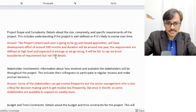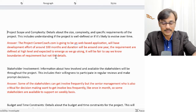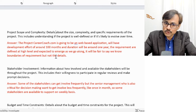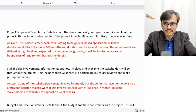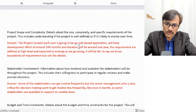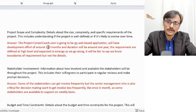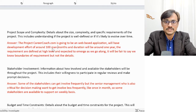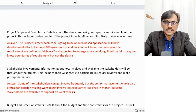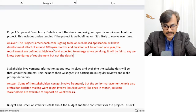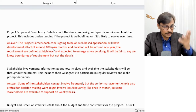I'm sharing my Word file with questions and answers. The first question asked about project scope and complexity — the size, complexity, specific requirements, and whether the project is well-defined or likely to evolve. My answer: projectcareercoach.com will be a web-based application with around 100 man-months of development and a duration of around one year, meaning about a 10-person team. Requirements are defined at a high level and expected to emerge as we go — we know the boundaries but not the detailing.